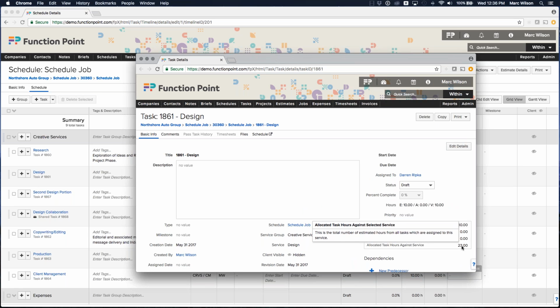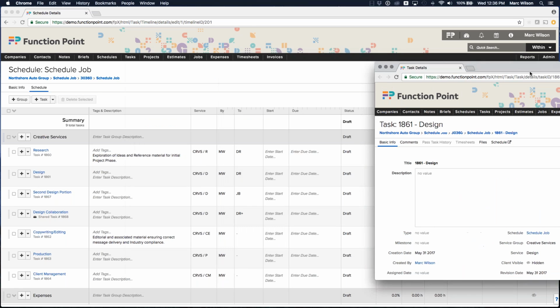I'm going to choose to not delegate that time. And I'm not going to bump up the task estimated hours with those remaining 7 hours, because that's buffer room for me. I know that I have 7 hours in case there's any revision requests that maybe are out of scope that we're not going to include in the initial pricing. Or if there's some sort of internal issue that causes us to go over, I have a bit of buffer room there.